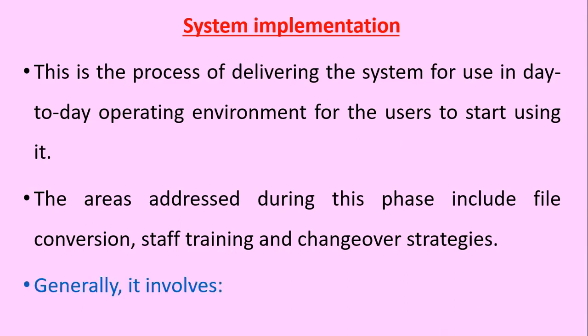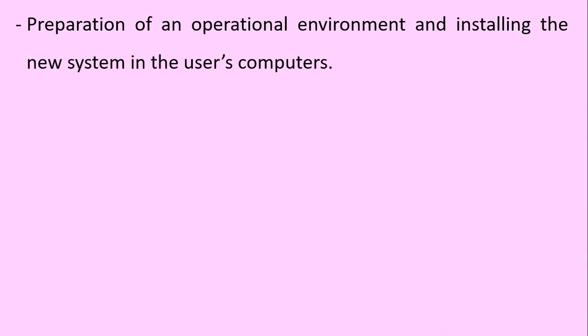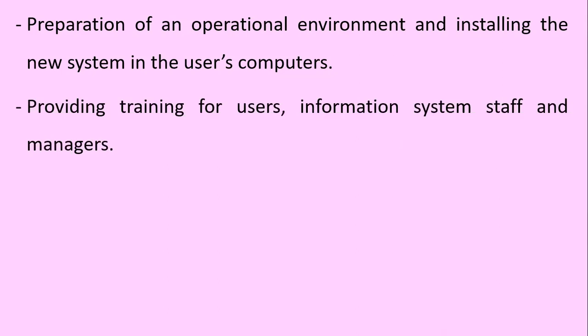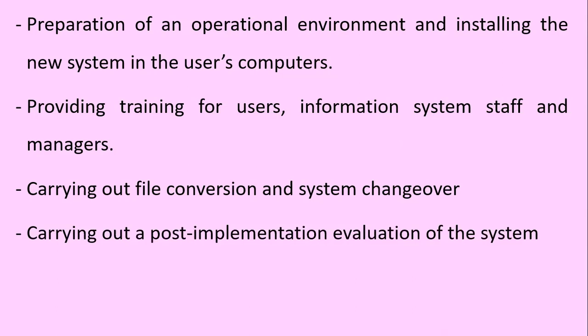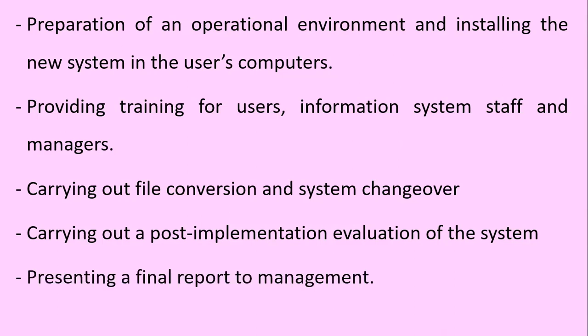It generally involves the preparation of an operational environment and installing the new system in the users' computers, providing training for users, information system staff, and managers, carrying out file conversion and system changeover, carrying out a post-implementation evaluation of the system, as well as presenting a final report to the management.